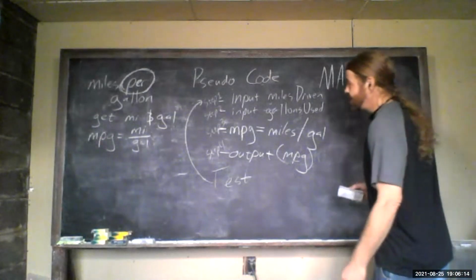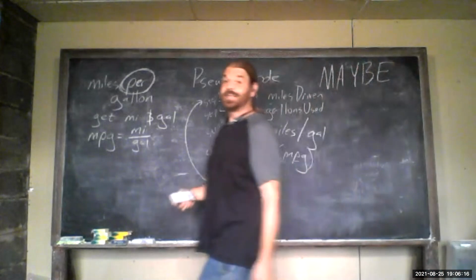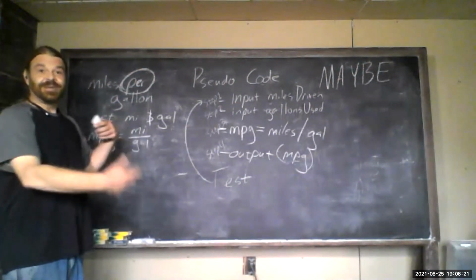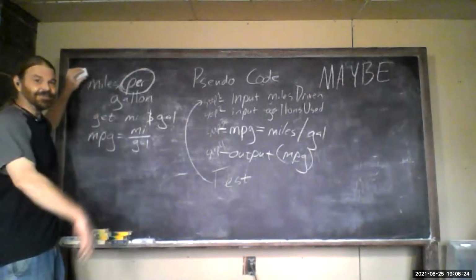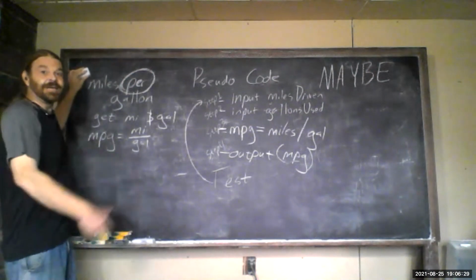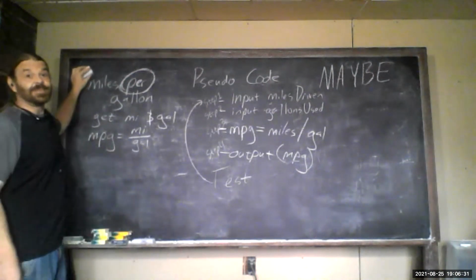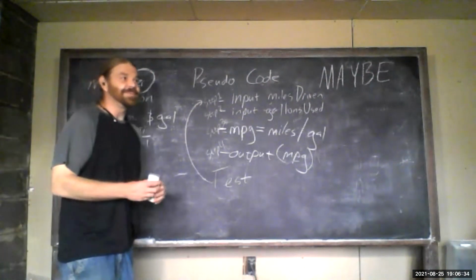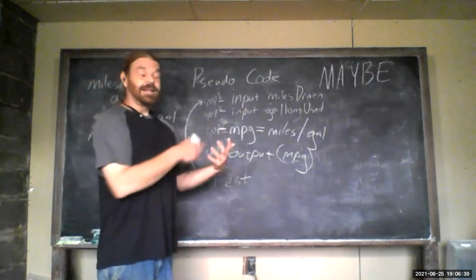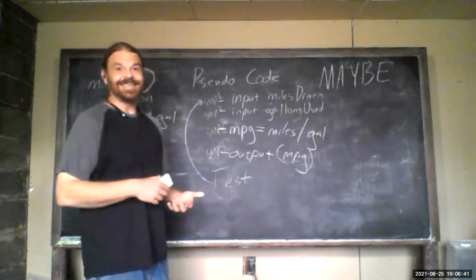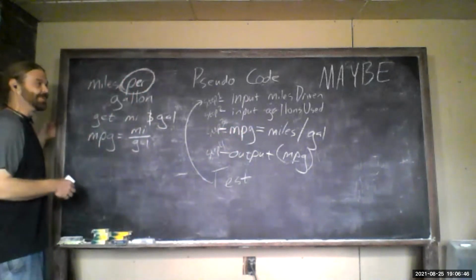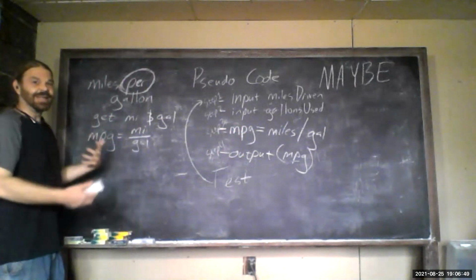So one of the best ways to deal with that in any situation is just to remember that scope creep is good for version 2 or version 3. It's good for the next upgrade. You don't necessarily need to delay things or increase costs. Another good one for customers to limit scope creep, if they start making a lot of requests, is to just say something like, okay, I'll run the numbers and see how much that's going to increase the cost. That usually cuts out the request very quickly, once they realize that more features means more cost.